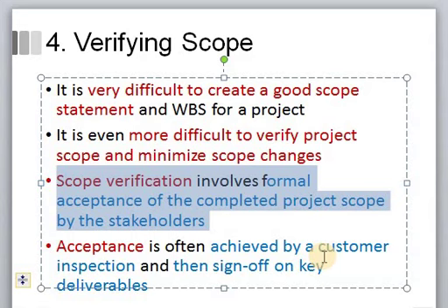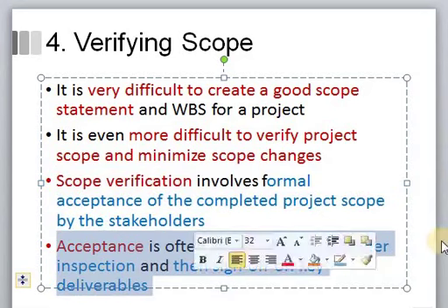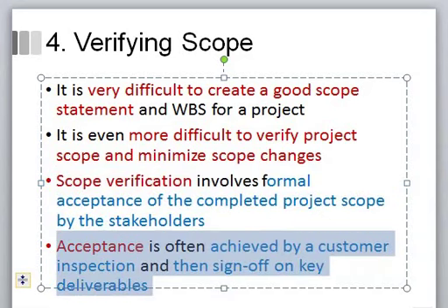The scope verification will be done by the different stakeholders of the project. The acceptance is often achieved by customer inspection and sign-off on the key deliverables.